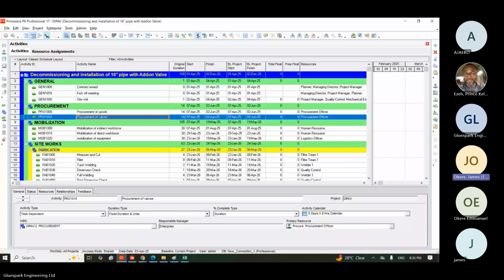They agreed to work with the plan. They are the ones that gave you the duration, that gave you the number of persons to use, right? And everybody is committed to do it. That's why if you watch the procedure I gave you, there's what we call signing out the schedule. Everybody signed the schedule that we are going to deliver within this period of time, right? So why is it that during execution, they now see you as if you are coming to monitor them? It's just a mindset, but you must clear that mindset and neutralize it.